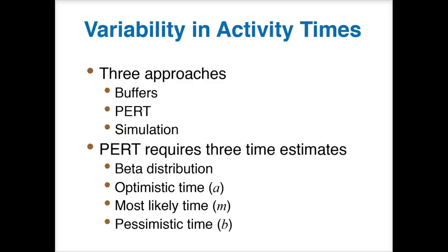And so when we do PERT analysis, what we're basically trying to do is add in probability to this. And so we look at the 15-week mark as sort of the mean or the ideal case. But we also want to look at two different times. And so this is called the optimistic time, meaning if we can finish the project early, how many weeks would that be? As well as the pessimistic time, which is if we run into some problems that we sort of guess might happen, how long would that be?